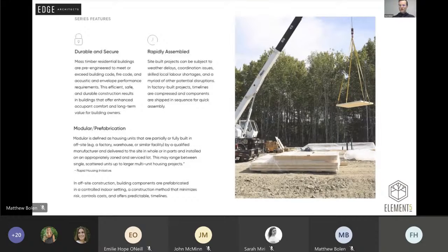So one thing we've done is, in a lot of our conventional projects that do use non-combustible building, such as cast-in-place concrete or particularly precast concrete, we basically took the same logic that we use when we were laying out precast concrete or total precast type building structures, and we tried to design this mass timber in a way that could be compared apples to apples with that system in terms of the dimensions and how those things are laid out. And as we'll see in some of our further slides, that rapid assembly is actually assisted by the mass timber product, simply in the fact that a typical precast slab is about 4 feet wide versus what Element 5 is able to do at their facility and transport, which is about 3 times that width by the same length. So it really creates this efficiency in a third of the number of picks and drops on every site, which helps speed up construction significantly. So again, that ties in with the modular and those prefabricated components.